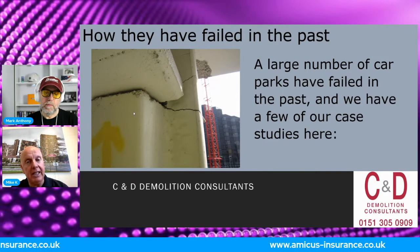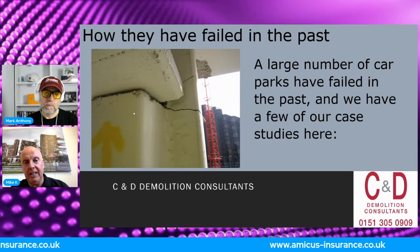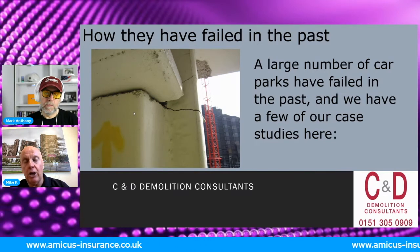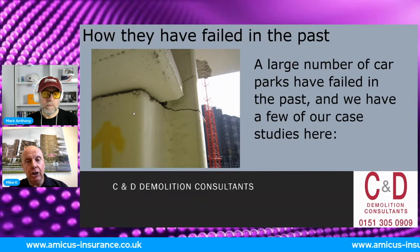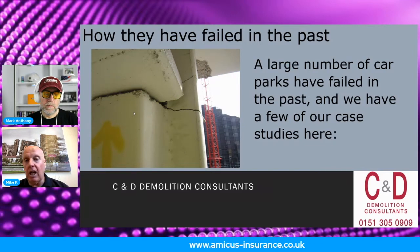Thankfully, as I mentioned before, DDS, JBV, I've worked with them on a number of car parks. They take it really, really seriously. Skilled operations. And on the one we did with DDS in Hammersmith, there were different types of reinforcing. Some we didn't find any girders, any trusses, any columns. Didn't have any reinforcing in. Some had loads in. Some had RSJs in. Completely different from one part to the next. So it's a complete engineering strategy you need to undertake. So anyone that thinks, I'll just rock up with the machine, I'll start at one end and crack on.